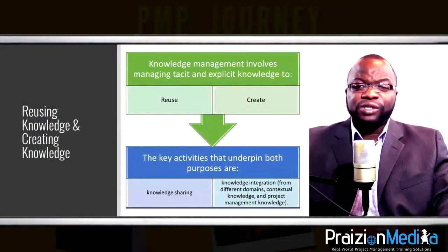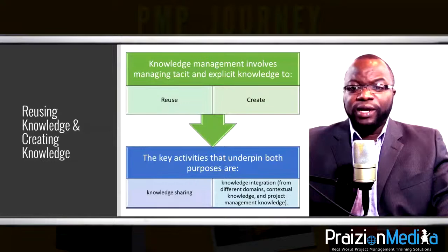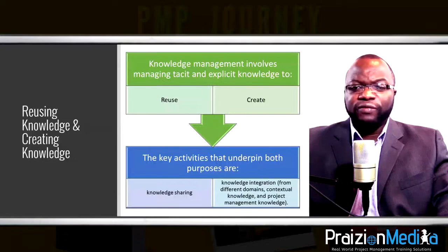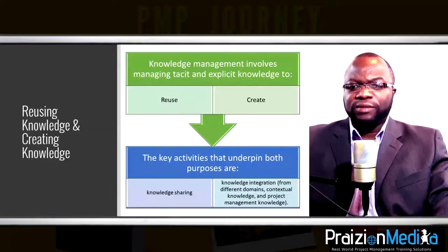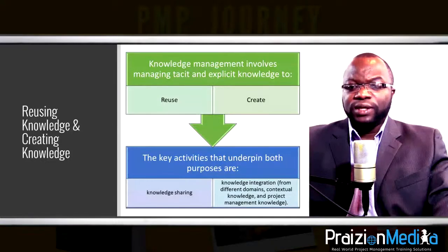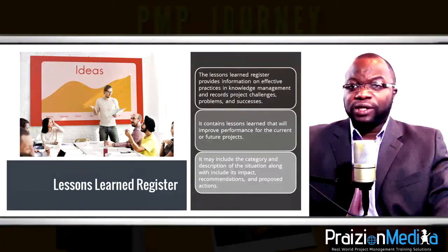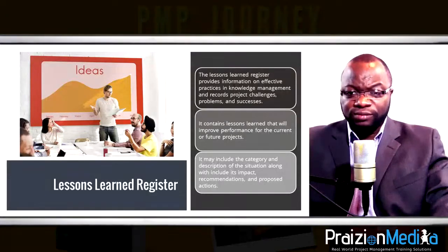Also, provide a conducive, trust-based environment and a forum for sharing knowledge, such as communities of practice, networking events, coaching, mentoring, and other opportunities to interact and learn in an environment conducive for knowledge sharing. Manage project knowledge deals with the managing, generation, capture, exchange, usage, and archiving of such useful knowledge. Lots of this knowledge can make its way into the lessons learned register for use on other projects.